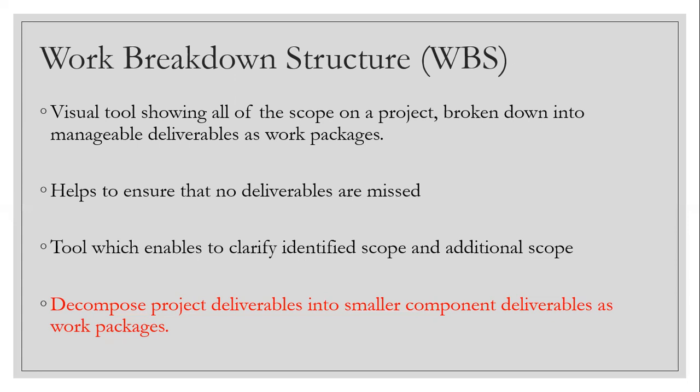Normally, how it is done, I will tell you, and I have done it twice in my parent company. The entire project team, say 10, 20, 30 people, fly out to a location and book a conference room for probably 5 or 6 days. Day one, they focus on the project scope statement, WBS, and the dictionary. So on day one, they sign off the project scope baseline. Day two, they focus on the activities, the network diagrams, the critical path, and the schedule of the project. And on day two, they sign off the schedule baseline.